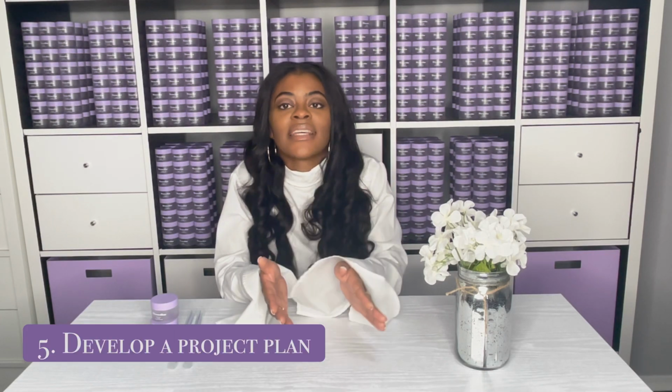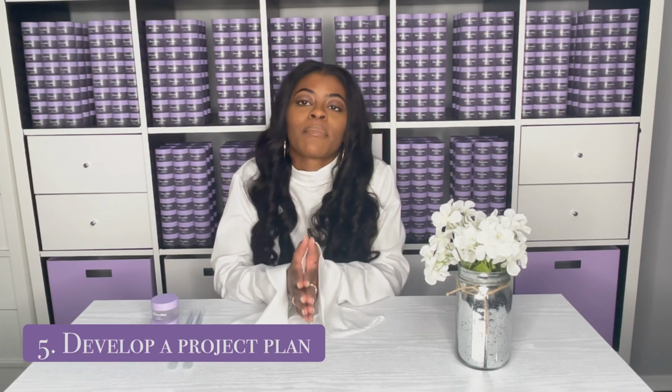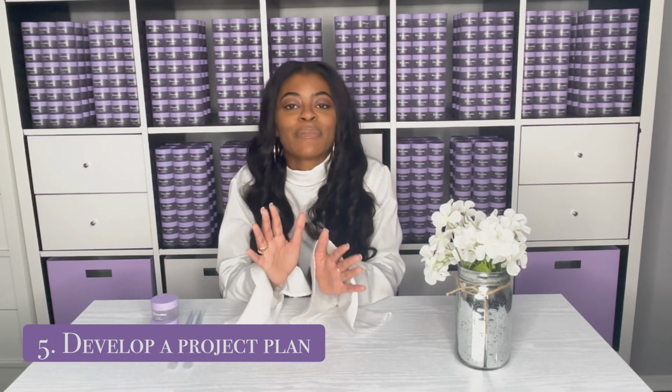The 5th thing that I did was to develop a project plan. So coming from corporate America, I knew I had to have some type of project plan in place so I could actually launch on time when I wanted to do so. So I would always suggest to start with your launch date and work your way back. So, okay, if I want to launch in 6 months, this is what I need to do up until then. If I want to launch in 1 year, this is what I need to do up until then. So very important to set a project plan.